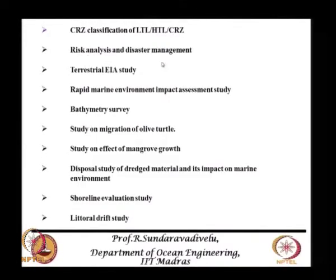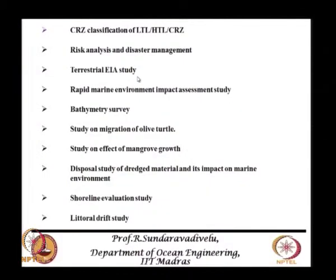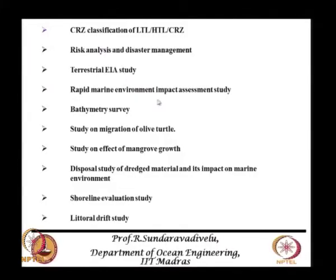Risk analysis and disaster management should also be included — that is called a terrestrial EIA study. Terrestrial means on land; marine means on water. There is an accreditation council — the National Board of Accreditation — which has accredited agencies that can do the terrestrial EIA; only those agencies can do it. Marine EIA accreditation is also being done but is not yet completed. This change means only qualified agencies will do the work — that is the terrestrial EIA and rapid marine environmental impact assessment study.